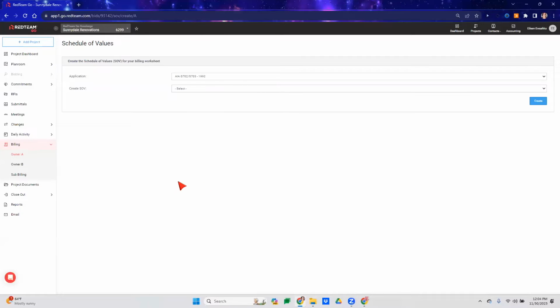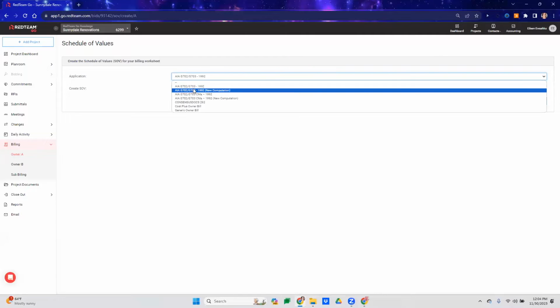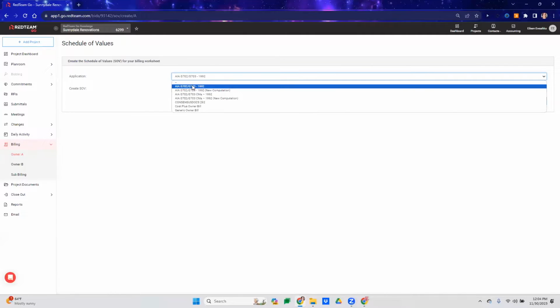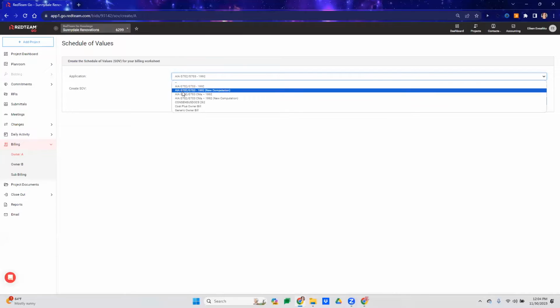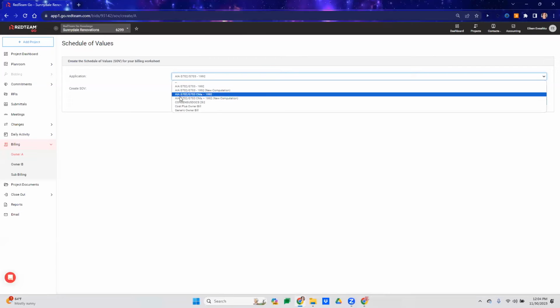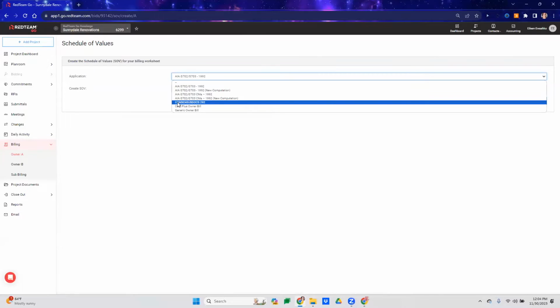Now, once here, the first step of owner billing is to create your schedule of values for your owner. We have a couple of options over here. The first step is you're going to want to select your application. This is your type of owner billing. Now, if you do have an AIA subscription, you will have the option to select from different AIA pay apps. And if you have a consensus doc subscription, you'll have the ability to select consensus docs here.